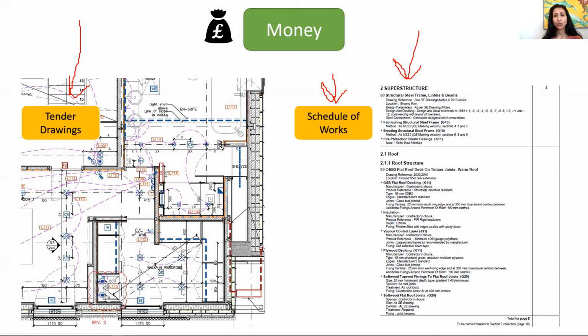These documents include all things possible that need to go in the structure of your building and on top of the surfaces like tiles, light fixtures, the circuits, the number of circuits, the switch plates and sockets, the bathroom fixtures, the door window details, your hard and soft landscaping details. And how does this help? Clearly mentioning all the items required and the quality of workmanship that you desire will give you a firmer budget for your project. And this will lead to less shocks of cost escalation midway your construction.